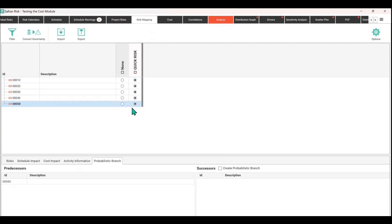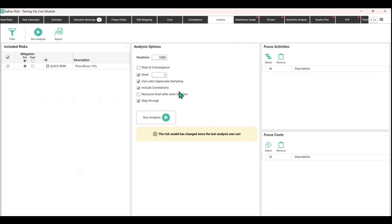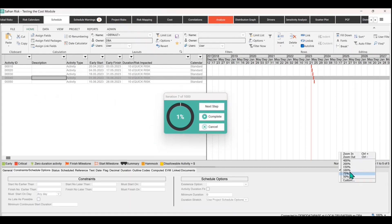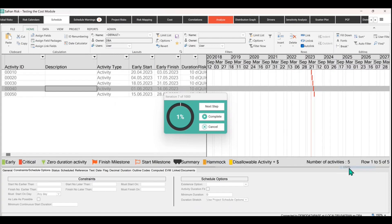The risk mapping, once you've got your quick risk, you can then add 10 plus or minus duration uncertainty to each of these activities. If we now ran the simulation, we would actually see the Gantt chart moving around in time.